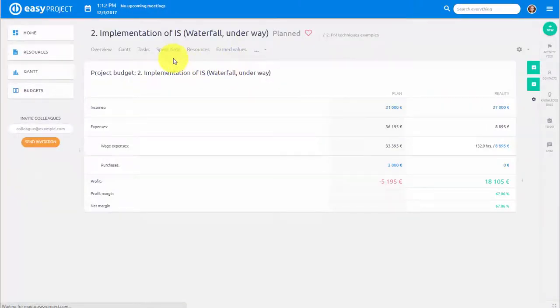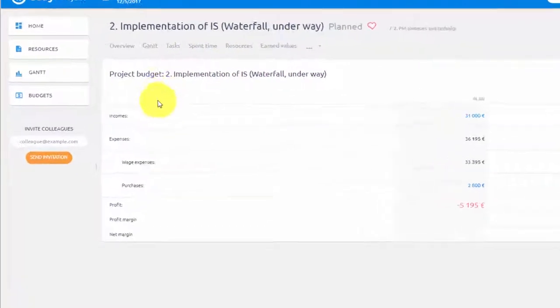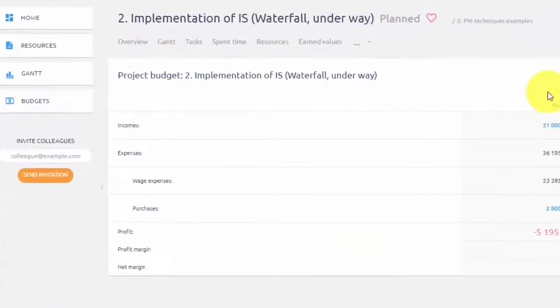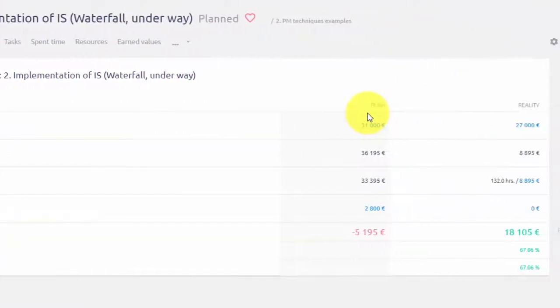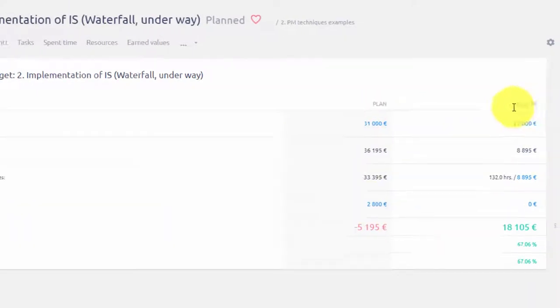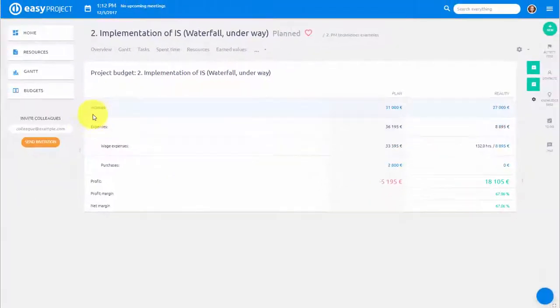Over here you can see a budget overview on a project level. The first column shows planned values and in the second one you can see the real numbers.